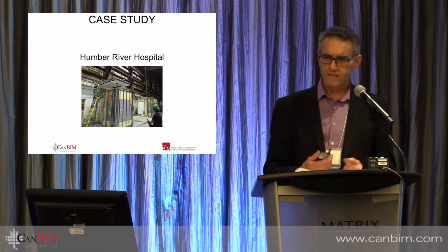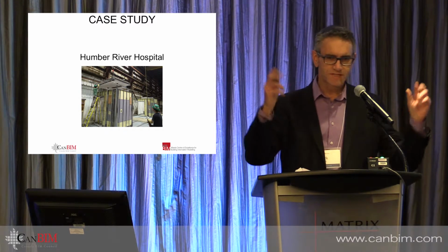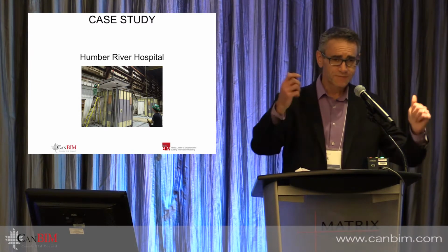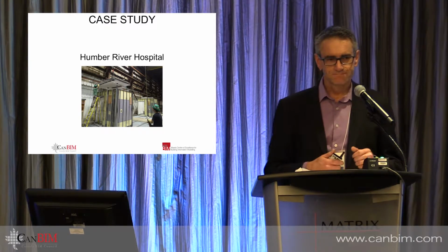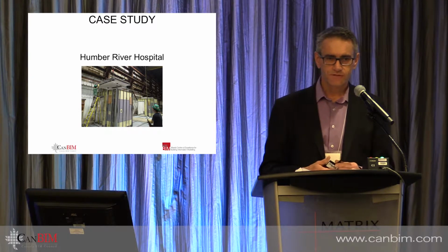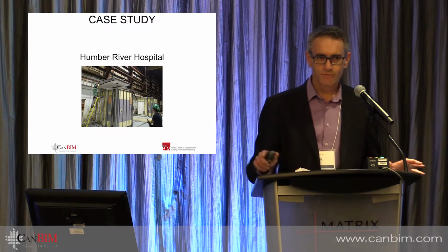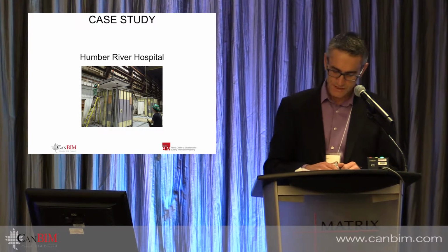Head walls were a bit of a lessons learned for us. We had 500 of the same Type 27 head wall. Great, let's build 500 Type 27 head walls, until we started digging in. Type 27A, B, C, there were 38 versions of Type 27. So at that point we said, listen, it doesn't make sense anymore. So we dropped that from the package there.